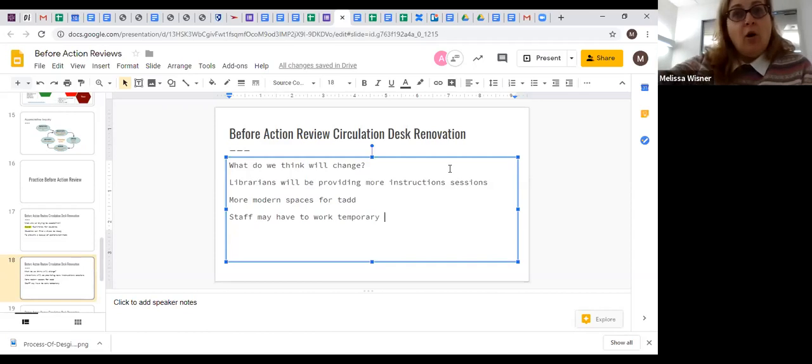You know, or again, a whole list of tasks and deliverables and integration work with telecom or other things that comes from doing that or thinking that through. If you have to work in swing space, do you have to change campus directories? Can you keep the same phone extension? Does that put you in a remote location on campus, which could affect your ability to participate in certain meetings?